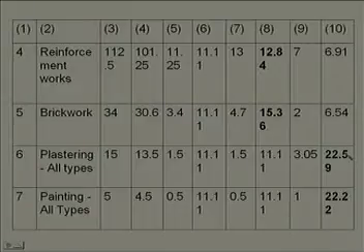because it is expected that plastering will be taken up at a later date when the project is nearing completion. So, in back end loading, you can notice that we have increased the margin percentage. So, this is what you have to note in this particular slide, whereas if you notice column number 6, you will find that margin remains constant, 11.11%.